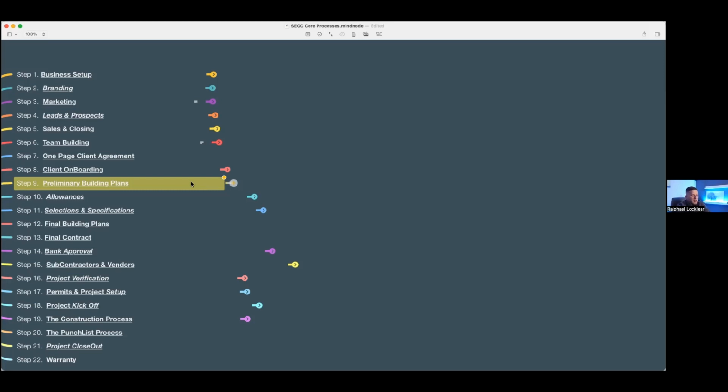Now, when Adam, our designer, is drawing these plans and creating the heated square footage, he's tracking all of this at the same time to make sure we don't go too large on our square footage. And also when they're designing specs and selections in the plans, he's making sure we're not going outside of that projected range. And if we do, he documents that he's made the clients aware and they acknowledge, so there's no confusion as we progress with the project.